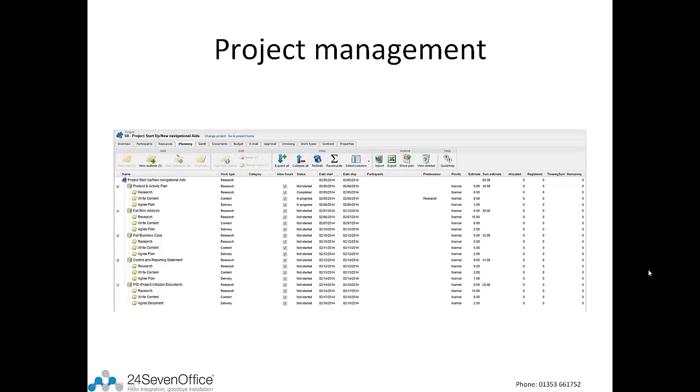The planning is where you then set up the tasks, subtasks, milestones for the project or the part of the project, and these plans can also be imported into other projects. So if you have standardized project plans, they can be reused without actually having to develop it each time. It also shows the estimated time, and also it displays the status of the different tasks.